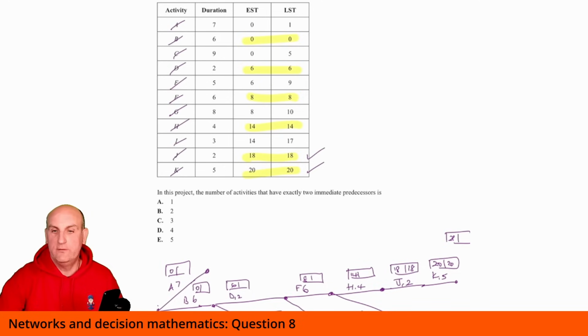That's annoying. I can't remember how to do this question. Okay, so because I've got to do a number minus 3 has got to give me the 17 in there, it's got to be 20, all right? So in which case, that's got to go and connect in here, I think. Yes, because I've got my latest start time there, so 20. So again, I've got this 20 here, minus the 3 gives me the 17. So there's my J connected.